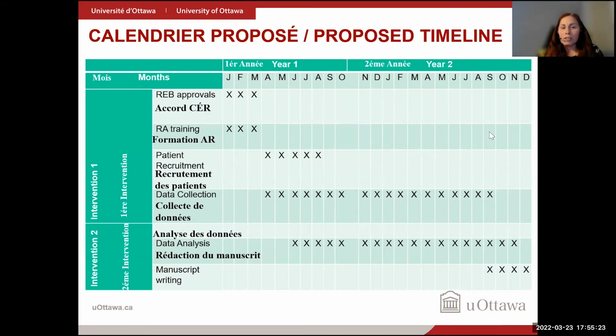And this is just an example of the timeline that you might have in a proposal. What to take from this is that you have to be generous and realistic at the same time with the timeline. And you need to realize that some steps are prerequisite to others, so your timeline needs to respect this and reflect it. So in research, there's no way you can start recruiting or doing any sampling before you get all the necessary ethics approval or exemptions.